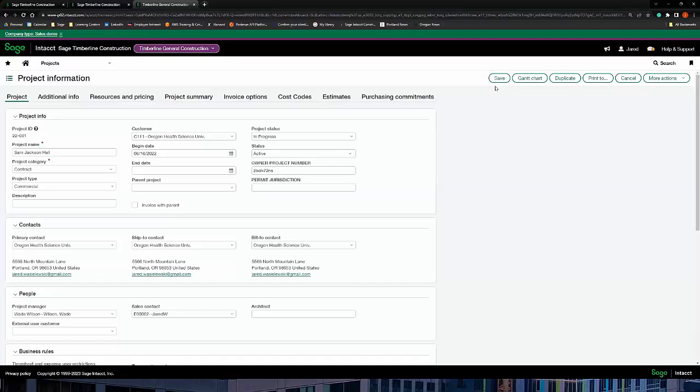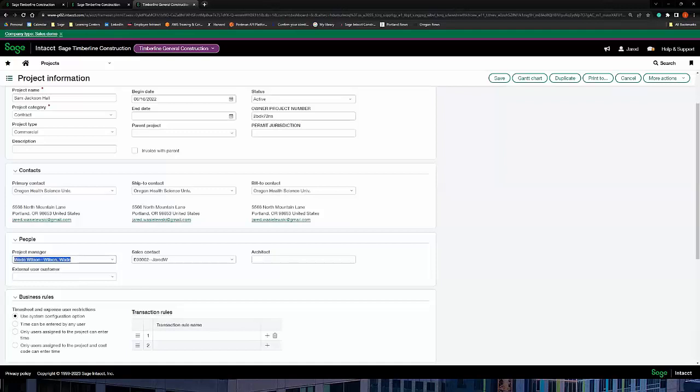Now, where smart events come into play, they act a little bit differently. These act as more of a tool to help automate notifications, right? So think of it as if, then what? So if this project is currently under, say, bidded stage, and it goes to in progress or awarded, then I want you to automatically email the project manager that we have located here that you have a new project available to you, and they're able to, at a click or a glance, go right into Intacct to view that new project. All right. So again, that's that kind of if-then logic that we have within Intacct.